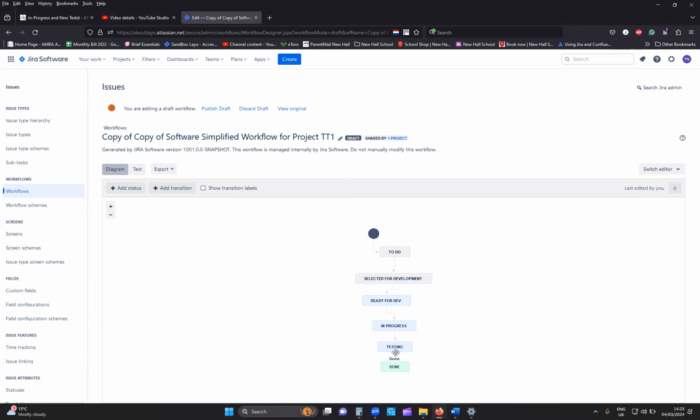If you're using Advanced Roadmap, for example, and you're pulling the information in your Jira into your Advanced Roadmap, and you're trying to see all the done statuses as well. In that instance, you will not be able to see the done status appear in your roadmap just because you haven't done the resolution screen.